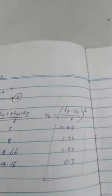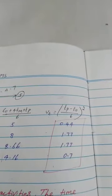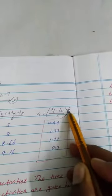Let's see the problem. And it also having a variance. We need to find out a variance of the particular activity. The variance, we're having a formula of TP minus T0 by 6. The whole square is the formula for variance.